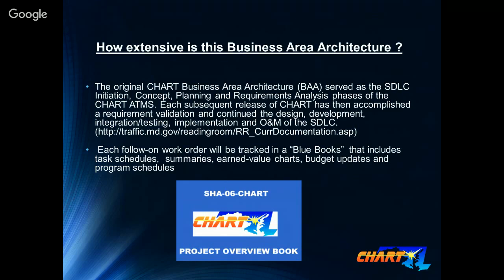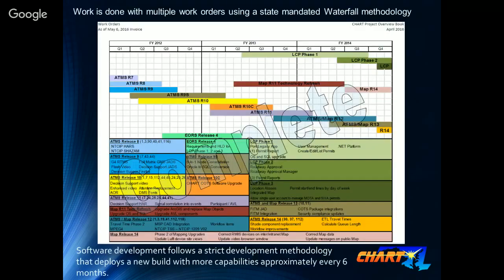So what does that look like? I'm glad you asked. It looks a lot like this. This was a year, or multi-year, where we would show that it's going to look like, let's say a waterfall, to where we would have multiple builds going on at the same time, and while one is at the beginning, one's in the middle, and one's being deployed. And we found that we could do about 3 major builds per year with several minor builds stuck in if we followed this very rigorous methodology.